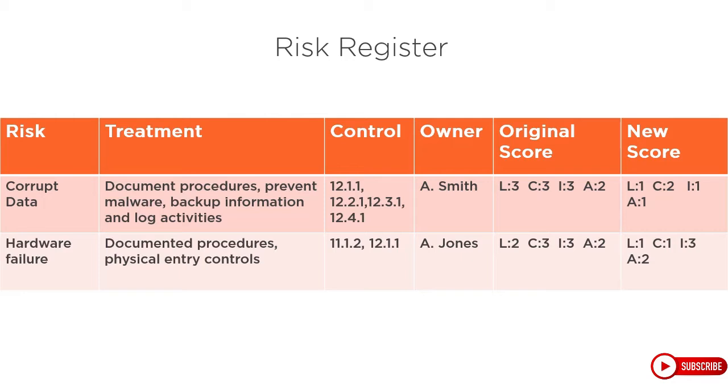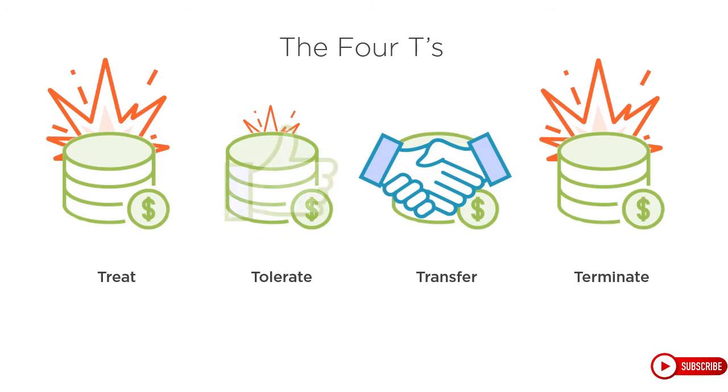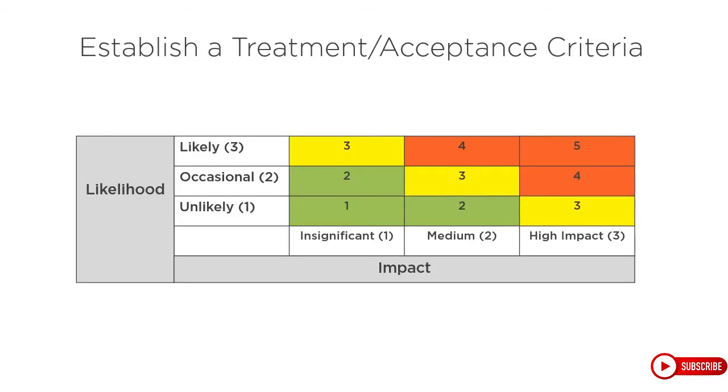It is important to note here that it is not enough to just list treatments in a plan. You need to reach out to the other risk owners and explain the responsibilities of managing the risk. Alright, tolerate. Accept and retain as is. A low risk is still a risk, but because the mitigation effort does not justify the results, the business acceptance criteria says we are cleared to accept the risk.